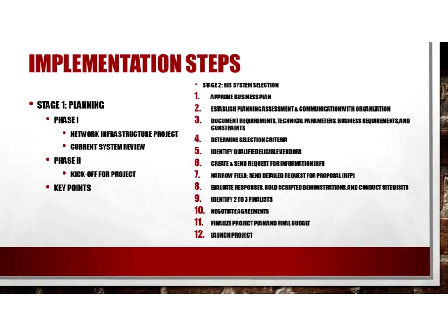Do not choose a software vendor or deliver a system without a full current state and SWOT analysis. That's what we just got through talking about. Those are important so that you know what you're looking for in a system. The current state documentation should reveal the topography or layout of the new system. The physical layout of your workflows is going to be a key element of what is discovered when you do analysis of your current state. So it puts the light on all your nooks and crannies of the organization's physical layout into which that system is going to extend.